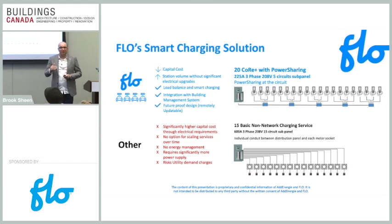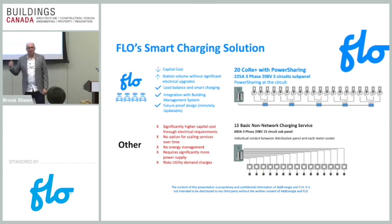The reason why I say, especially in multi-residential, to work with your utility is many utilities are willing to provide more support and more infrastructure into the building. For example, we're working on a project with Burlington Hydro and Paradigm, the new three-tier condo that just went in on Brant Street in Fairview, where Burlington Hydro has actually deployed a dedicated utility transformer specifically for charging stations. So literally they can wire 100% of that building with charging stations and it not affect the actual building capacity at all. Many utilities are willing to work with you when you're building out to help with that infrastructure investment and to really expand and enhance it. So they become really your best friends. Over 70% of our business is through utilities and through municipalities.